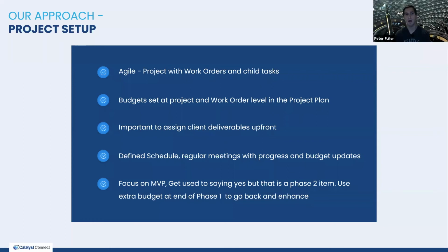I like that. I just want to ask a quick question to confirm, both you and Kyle. You guys bill a not insubstantial amount for discovery or a project plan, so that the final budget and the final scope can be as close of a good estimate as you think it can be. You're saying, John Mark, like, have a couple hours built in for lead nurturing process testing. The only way you can adequately know what amount of testing you're going to have to quote for is if you've taken the time to get paid to discover and build the project plan, right?